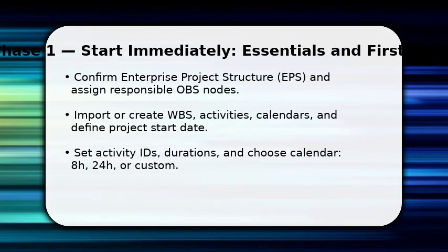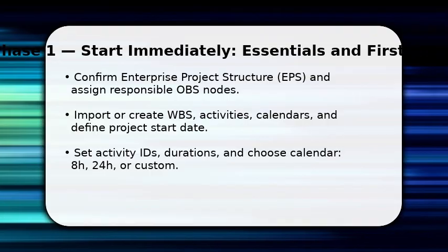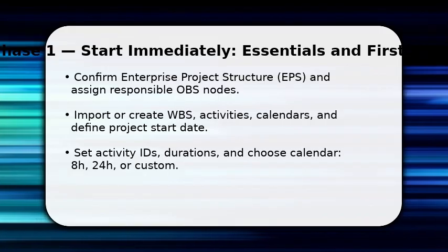You start by confirming EPS placement and OBS ownership so reporting flows correctly. Next, create the WBS and add activities with clear ID and durations. This gives structure. Once done, assign the project calendar and set the project start date to anchor dates.